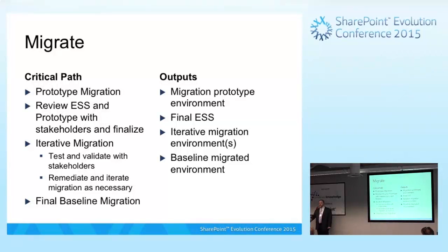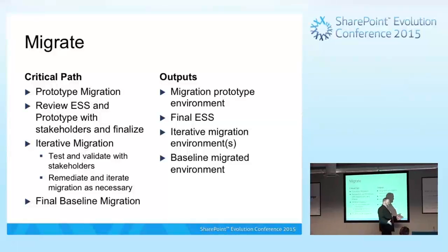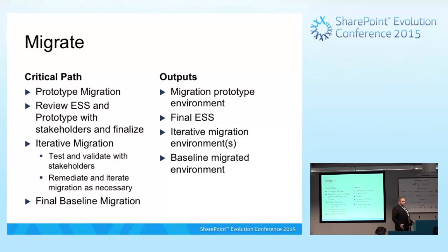Because every time you do that, you're going to get more information. Now, we're talking about a migration, right? This isn't a product development cycle. So there isn't a Q&A period. This, for migration, is your Q&A period. Every time you do the baseline migration, every time you pull everything over, you tweak, you've run it with a new tweaked map, every time you do that, you drive more testing and quality control.